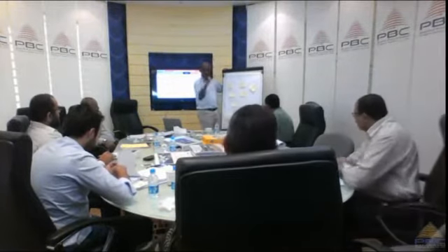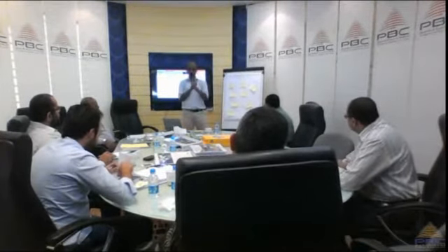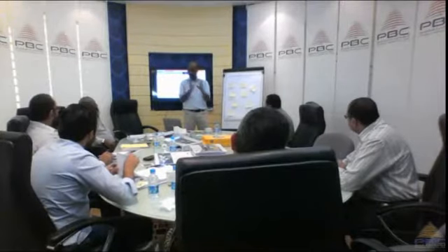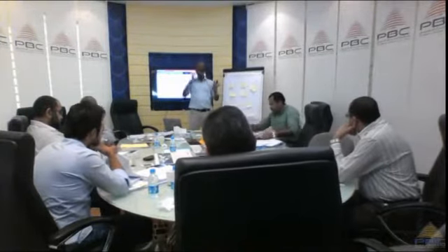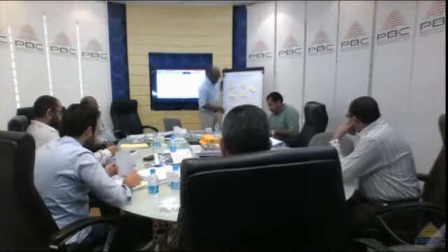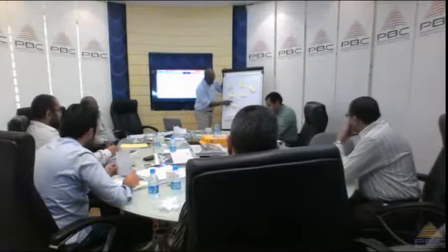What is P and what is I? When we classify risk based on the two components of risk, which are what we said, every risk has two components: a probability of happening and an impact. So the PI matrix is where we have probability in high, medium, low, and the impact high, medium, low.